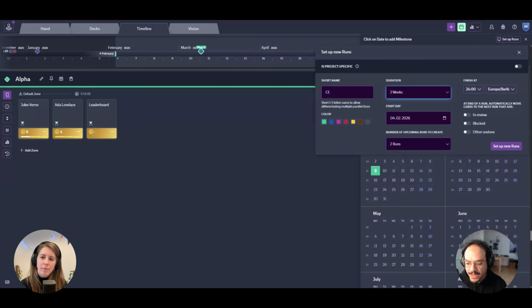So if you would say, let's have a planning meeting every 4 weeks, that can be fine, but in my experience, the tendency is to have shorter cycles at the start of the project and then longer during production. Towards the end of production, when you get close to shipping, you would probably have shorter ones again, because then you have to make those hard decisions about scope and so on. A good general rule is 2 weeks. It's a good starting point.